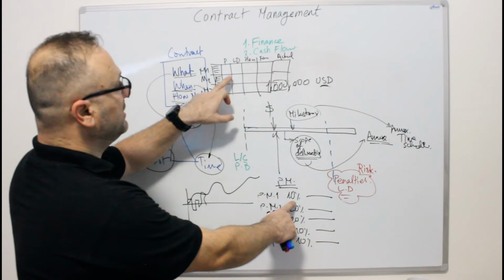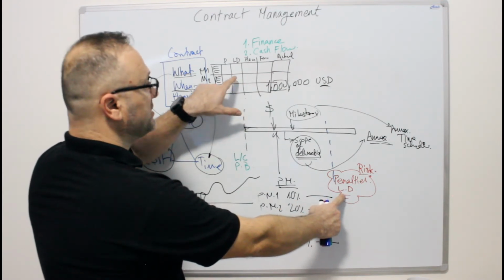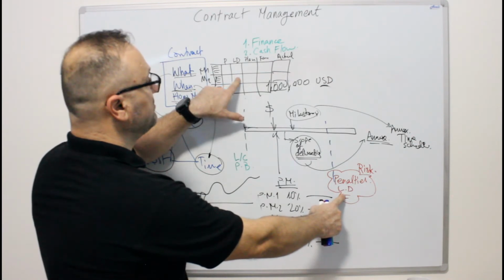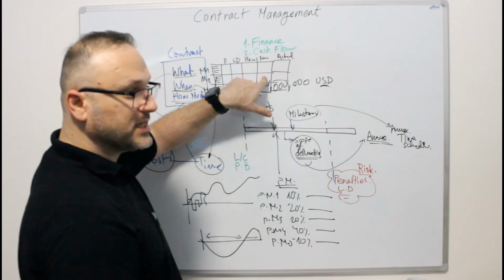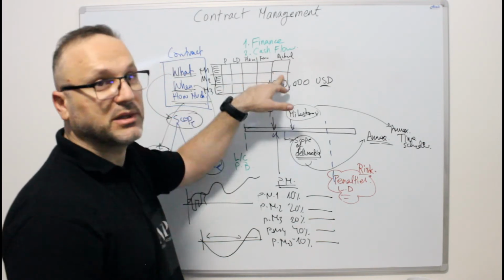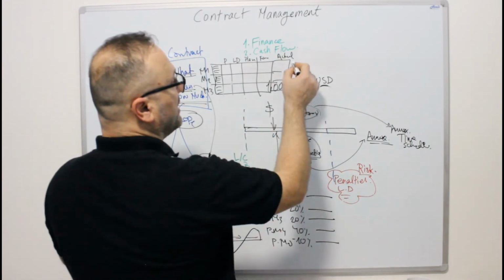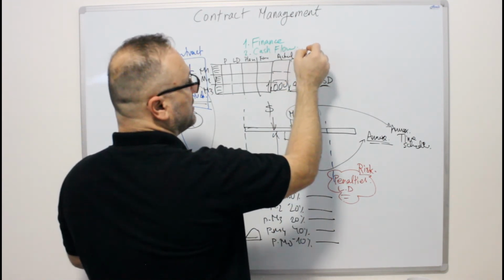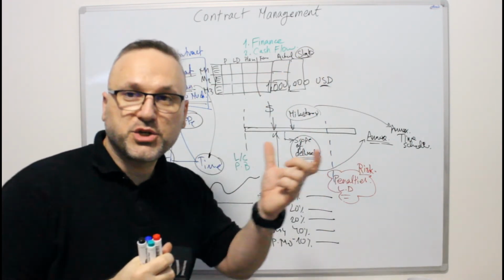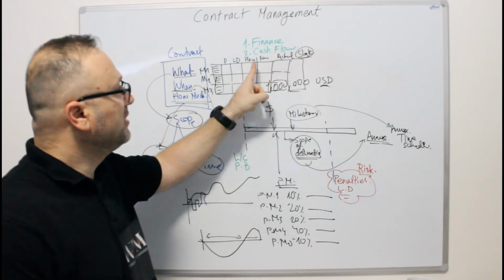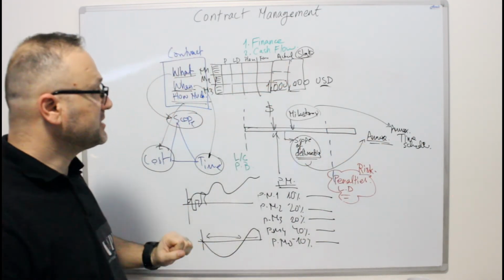I will write here liquidation damage, the definition of this liquidation damage, what the maximum value is, the planned date to complete, then the forecast date to complete, and then the actual date of completion once it's completed. Also, you can add the slack, meaning the deviation from plan to actual, whether it's in plus days or minus days.